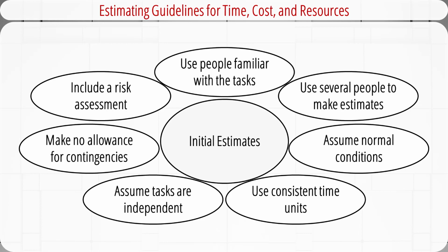Last, the project manager can provide risk assessment of the estimates to avoid surprises to stakeholders. A simple breakdown by optimistic, most likely, and pessimistic for each task could provide valuable information regarding time and cost.